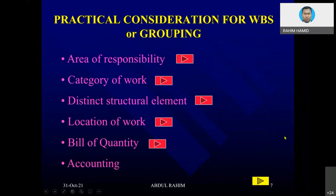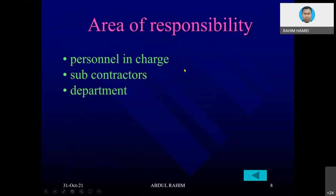Practical considerations for WBS grouping: look at area of responsibility — who is going to be in charge — category of work, distinct structural element, location of work, and BQ. JKR normally would like scheduling according to BQ because for them it is very easy to track payment. In a big project you could have different project managers. In KLIA for instance, they had managers looking after the control tower, main terminal building, cargo building, etc.